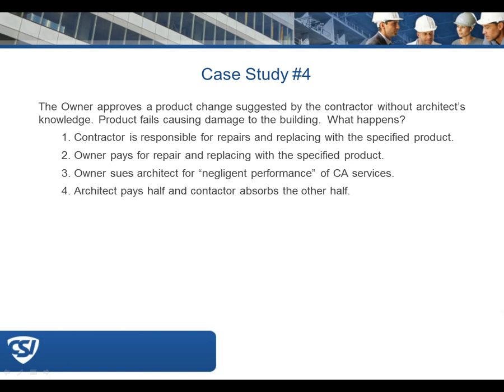Perhaps they felt like there would be a better quality product for less money. They had a hope of saving some of the project funds there. You know, there are so many nuances to what could be going on when you see something like this. Typically, when pre-construction conferences are held, there's a long list of information that's reviewed, and one of the critical things is, here are the people who are in responsible charge, who are allowed to make changes.